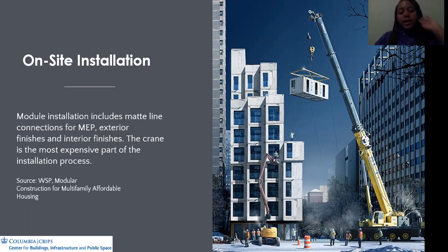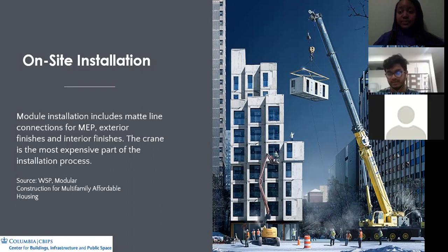Just focusing a little bit more on site. Once the modules get there, usually the on-site installation includes mainline connections for MEP. You have your exterior connections, exterior finishes, and interior finishes. And actually, the crane is usually the most expensive part of the installation process. Next slide, please.